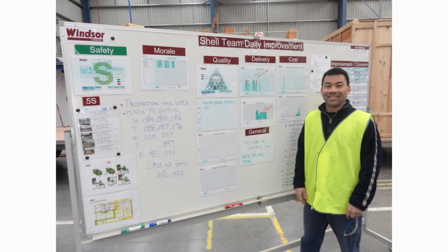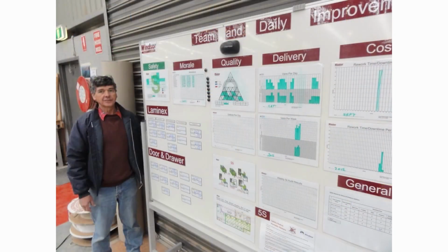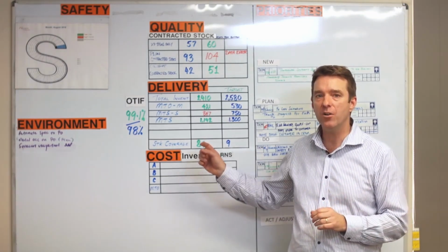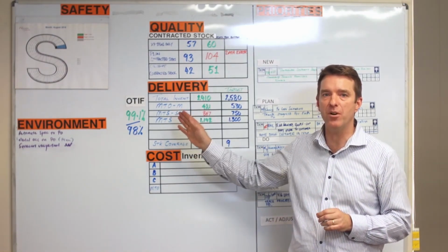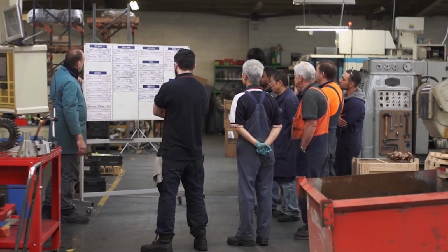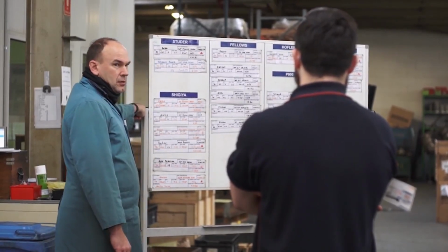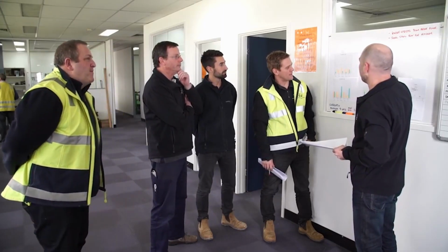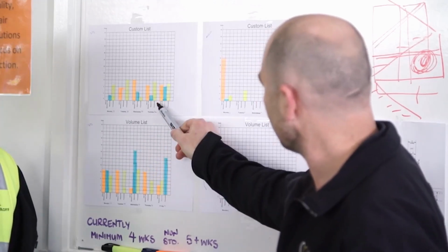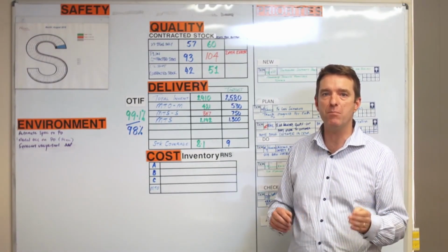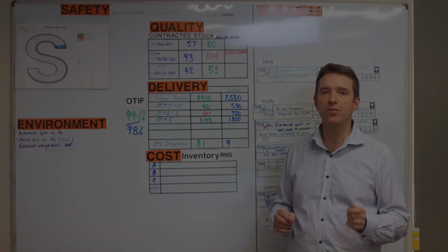Then you ask, what is the most important thing to talk about every day? Often a leader might need to stipulate that safety and health are the most important topics. A good tip is to simply put these headings up on a board and start to hold the daily stand-up meetings. As the meetings mature, you need to ask, what is the biggest thing we can control to achieve a good result every day? Then slowly introduce more topics over time to make the conversation more robust. Keeping it simple at the start and building detail over time ensures the right measures.